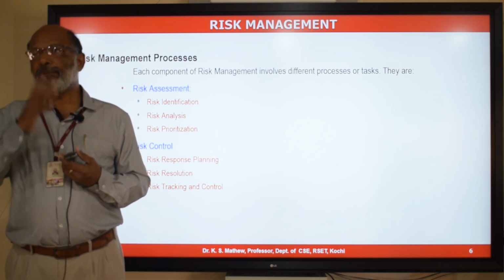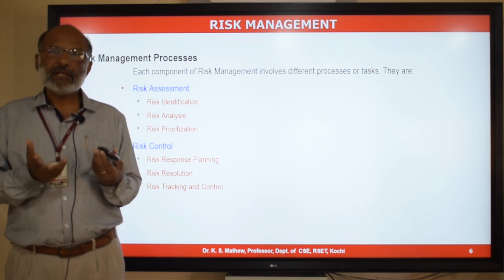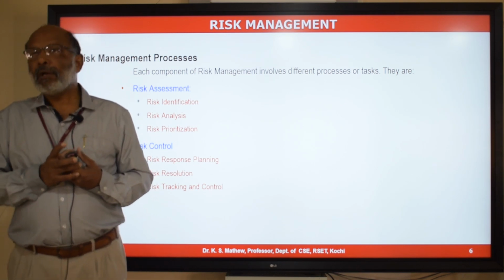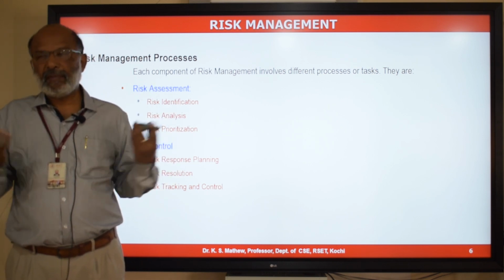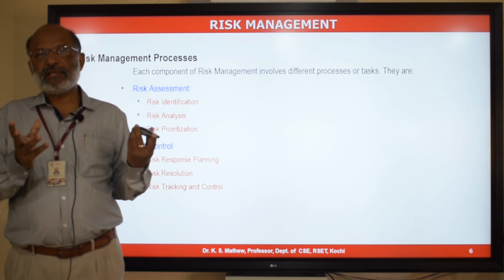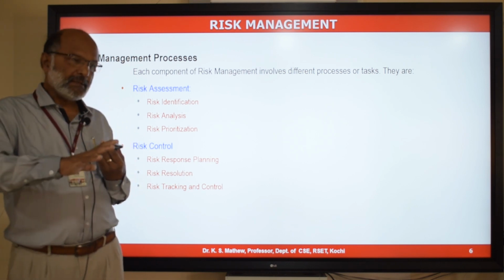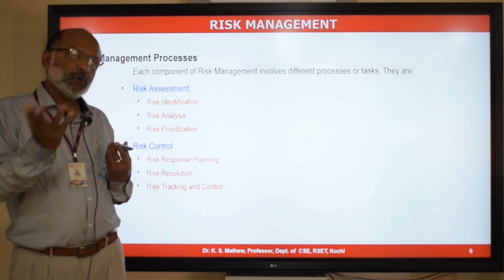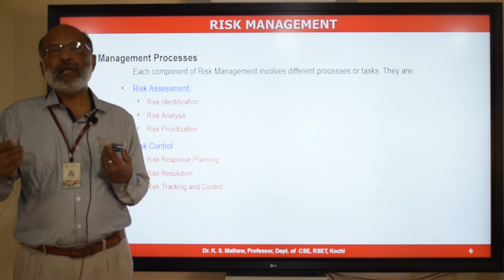So you may update the priority of the risk, you may identify a new risk, and you may also find that some of the risks which you have identified in the beginning based on some assumptions are no longer a risk, because as you progress in the project, you may get a lot of information about the project. Initially, you may have only limited information. You may take some assumptions because of lack of information and plan your project and go ahead. Once you take an assumption, there is a possibility that assumptions may go wrong. And if assumptions go wrong, the plans you have prepared based on the assumptions will also go wrong. That may lead to a risk.